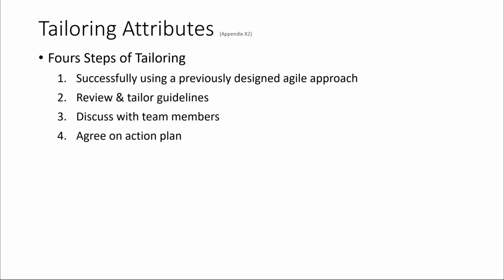As will be discussed in section 5, a good way to evaluate a change is to try it for an iteration or 2 first, before adopting it permanently, or consider a flow-based approach to try to deliver several features. Then reflect with a retrospective and reassess. When people know they can experiment and provide feedback on the experiment, they are more likely to try something new.